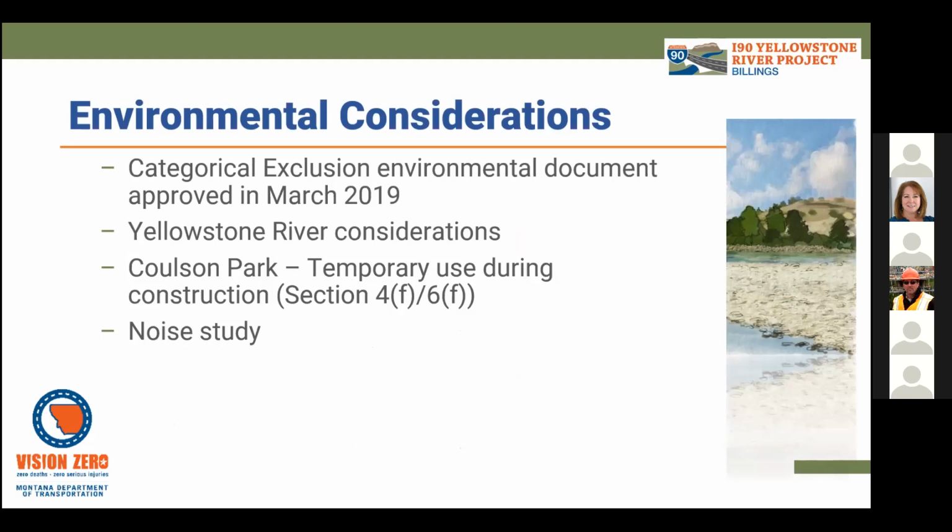I'm John Schick. I work for HDR, and I'm the lead environmental analyst for the project. I wanted to touch on a few of the pertinent environmental considerations for the project. The project is largely funded by federal dollars, so that triggers a review under the National Environmental Policy Act, or NEPA. And similarly, state dollars are used to a lesser extent to fund the project, and that then triggers a review under our state environmental law, the Montana Environmental Policy Act, or MEPA.